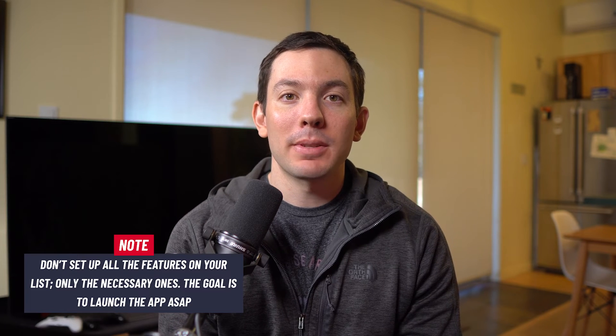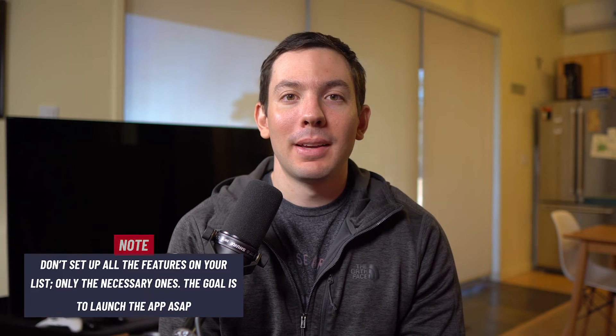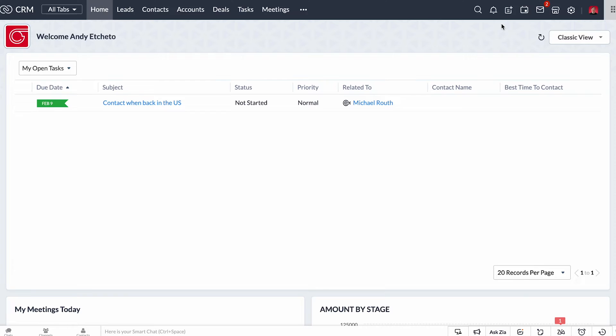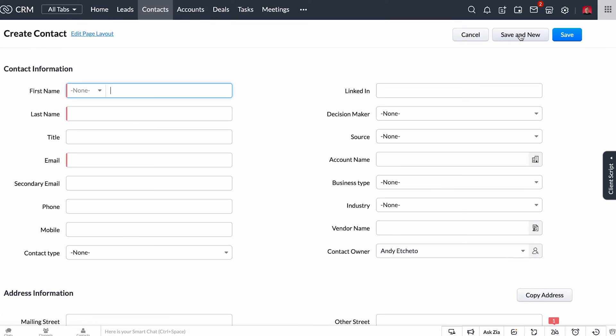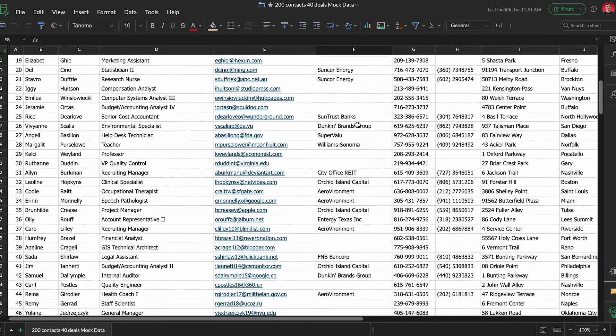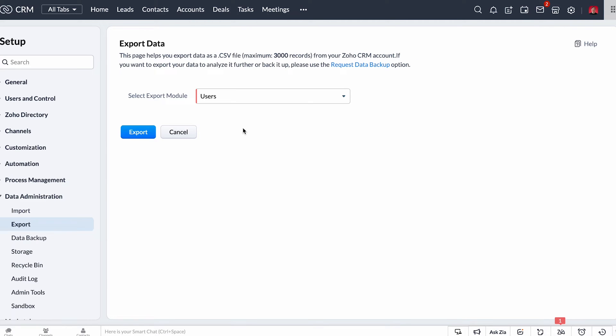The goal is to launch a new app as fast as possible, because once the users start using it, there will be a lot of feedback and you will have to make changes. After the basic features are set up, the next step is to test that everything is working. You have to be careful because if you integrated the new app with other apps, you will be triggering the integration while testing. To get some data in your new app, you can either create some records manually or import a database if you already have it. So if you're currently using a CRM and moving to a new one, you can export the data from the old CRM and use it in the new one for testing.